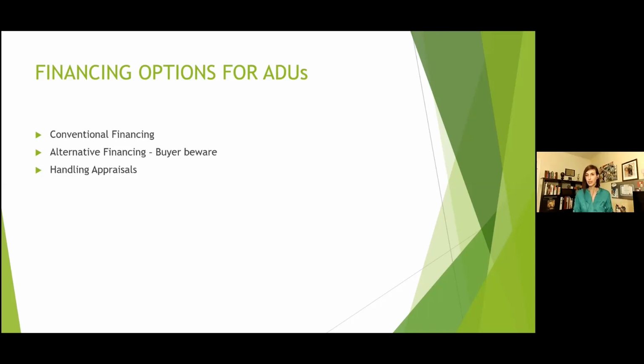We do all of the research, we go on site, and then we also look at the property and look for any potential things that we can see visually that may be a challenge. And then we really set the client up with the next steps. Are they ready to move on to the design phase? Do they have their financing in order? Do they need assistance with that? Are there some preliminary things? Do they need to do a site survey? Should they have their sewer scoped, right? Should we take a look at the title report? Are there questions about easements? So there's things like that we will advise on.